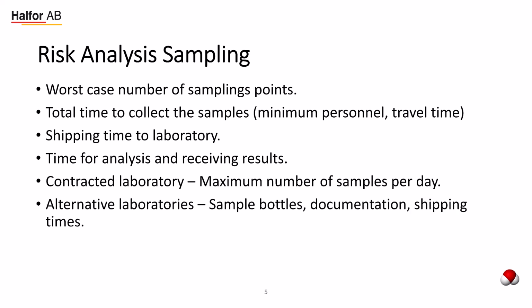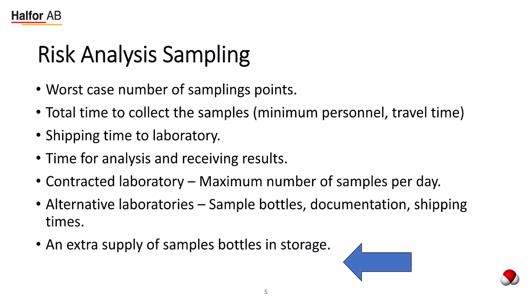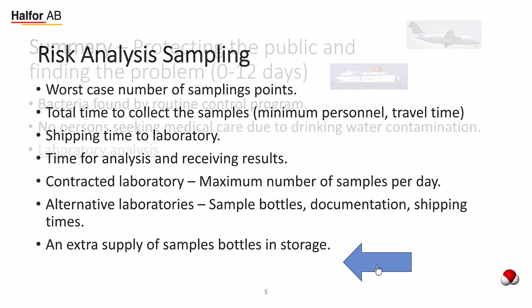In the risk analysis, you have to look at alternative laboratories if you have or may have a problem with overloading your contracted laboratory. Finally, maybe you should have an extra supply of sample bottles in storage if there is a great number of sampling points. This might not be a big issue, but important to keep it in mind.